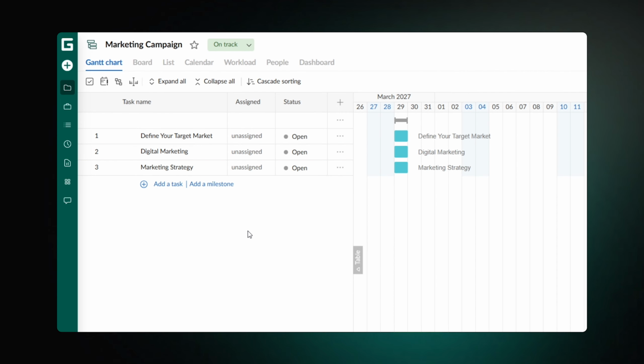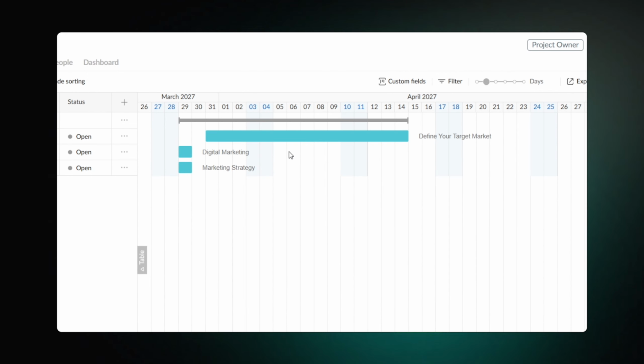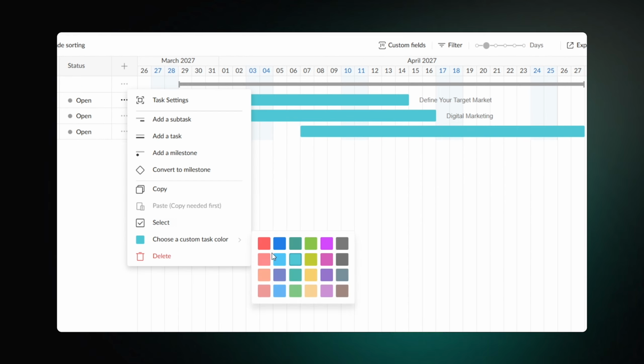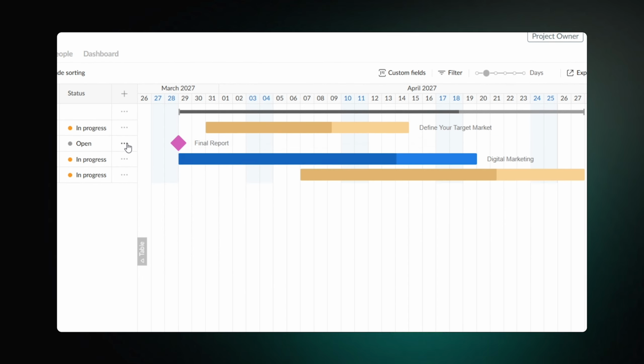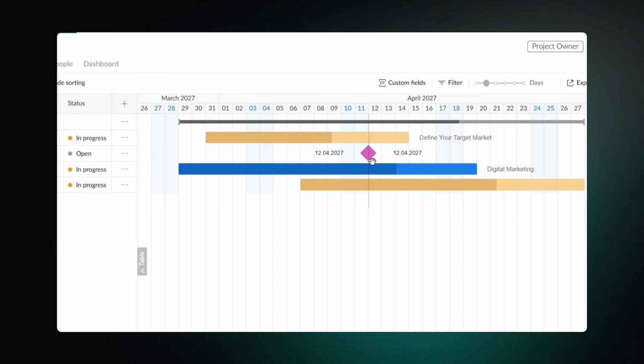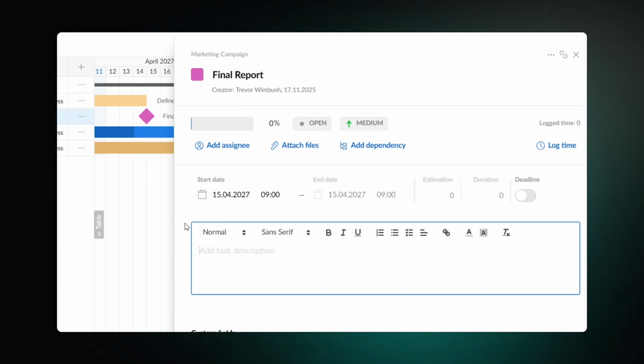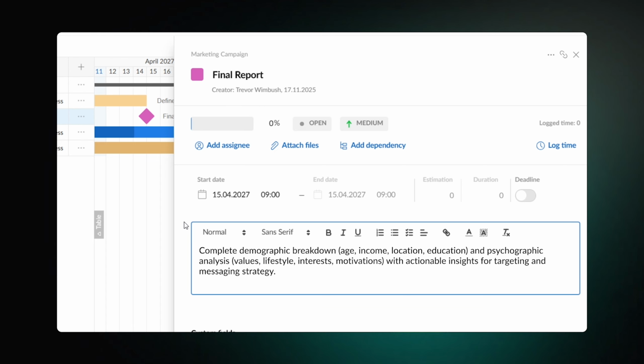Next, it's time to add the necessary phases. You'll have to divide the scope into multiple steps depending on the nature of your project. Then, outline all deliverables that must be completed within every phase. Each of them should have clear end results you'll need to achieve before moving on. In GanttPRO, it might be illustrated using milestones.